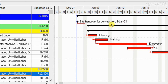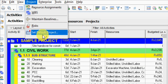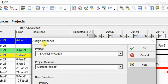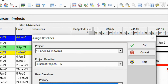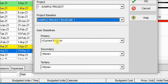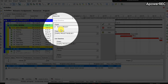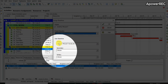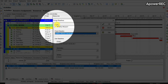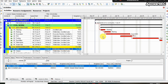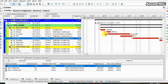Maintaining the baseline is not sufficient — we also have to assign it to the project. You can maintain up to 100 or more baselines, but you must assign a particular baseline to the project. Now go to Assign Baseline and select Sample Project Baseline. Only those baselines you have added under Maintain Baseline will be visible here. You will have three assignment options: Primary, Secondary, and Tertiary. At any given time in Primavera, you can have a maximum of three baseline comparisons on the project screen. You can maintain any number of baselines but assign only three at a time.